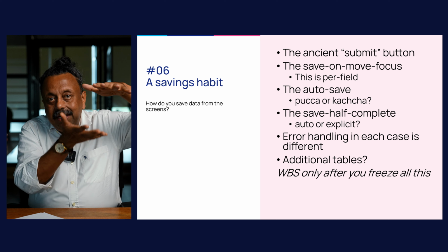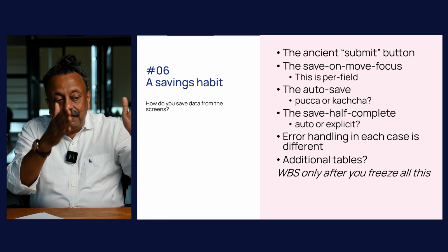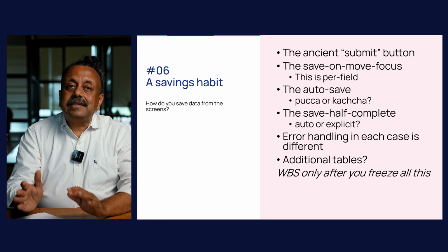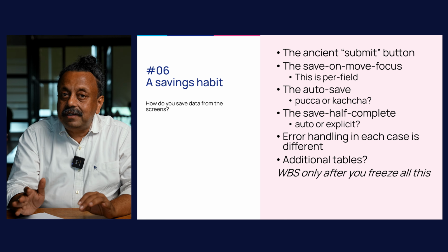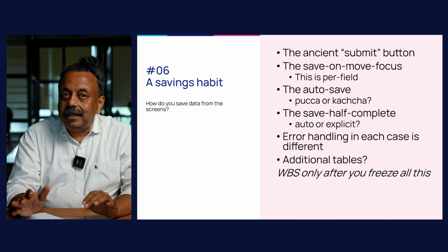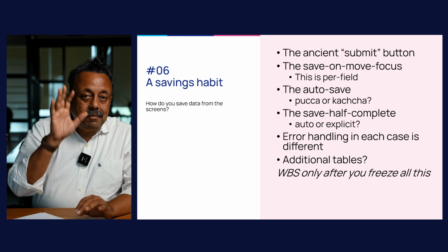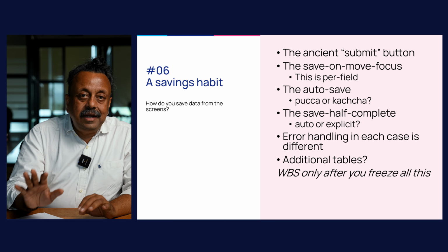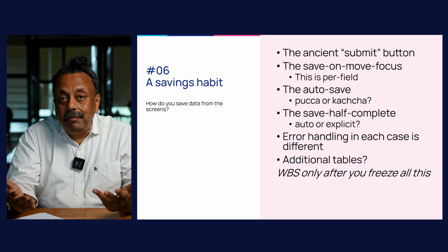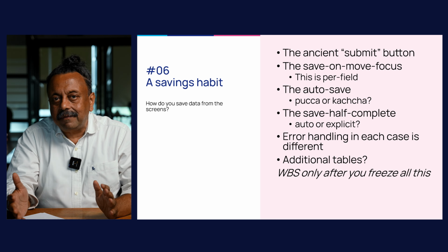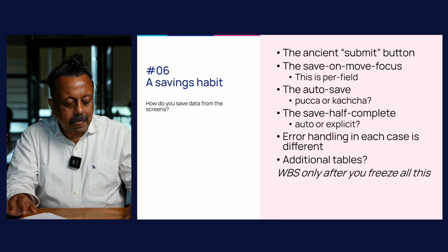So we need to take cognizance of this and freeze all these details before we decide the work breakdown structure and the effort estimate for the development activity. So make sure that these are not thrown in as afterthoughts, because if they are, they will derail your project timeliness and time tracking for your delivery.